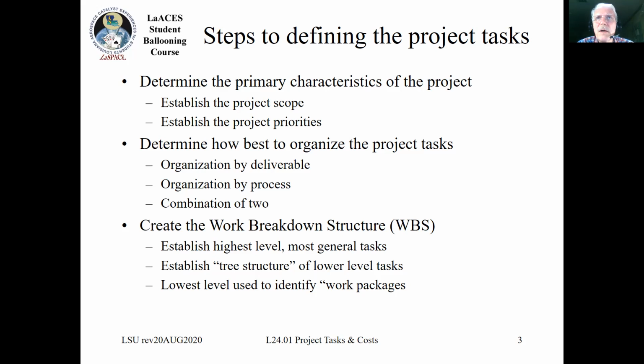Then you need to figure out how to organize the project tasks. Are you going to be organizing your project and your schedule by deliverable, by something that is actually handed over to a customer or entity, or by a process for how you make phases in your project, or some combination of these two.